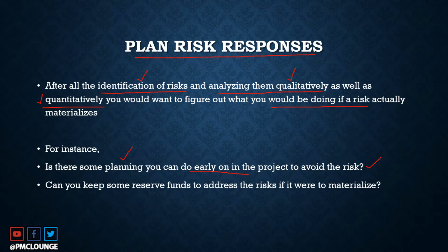Can you keep some reserve funds to address the risk if it were to materialize? This is something where we talked about the EMV analysis in one of our previous videos. Second link in the description, list of all the videos. Check it out if you're still wondering what EMV is. So when you calculate EMV, can you put some funds in reserve so that if a risk materializes, you at least have the cost to cover that risk?